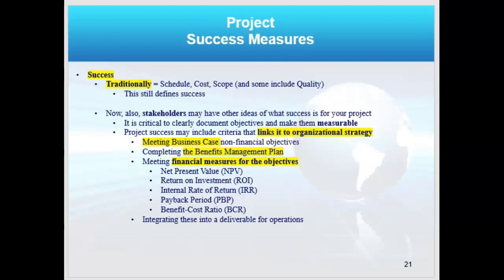Now, so as the project manager, we want to define success. Traditionally, success has always been defined as schedule, cost, and scope, sometimes quality, right? That's how we define success. That will always be the case, but now we expand success based on these documents to link to the organizational strategy. So, did we meet the business case? Did we satisfy the benefits management plan? Did we meet the financial measures discussed in those documents for net present value or return on investment, internal rate of return, payback period, benefit cost ratio, just to name a few, whatever the success is.